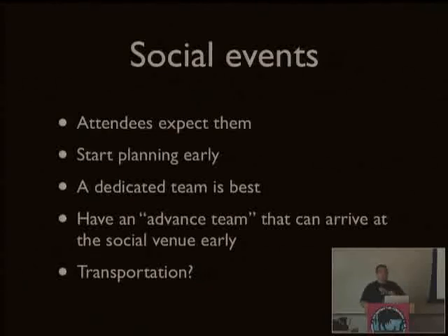If you have the people, take somebody and put them in charge of the social event and make that their one and only job. Because I will tell you, social events is something that always gets forgotten until the very end. We've got all the details of the event put together. We've got all the shirts ordered, all the badges printed, all the food taken care of. Okay, what did we forget? Oh yeah, what are we doing for a social event? Well, I don't know. Let's try to find a place. Well, sorry, everybody was booked like 3 weeks ago. Put somebody in charge of the social event. Make that their number one priority. Get the social event taken care of early.